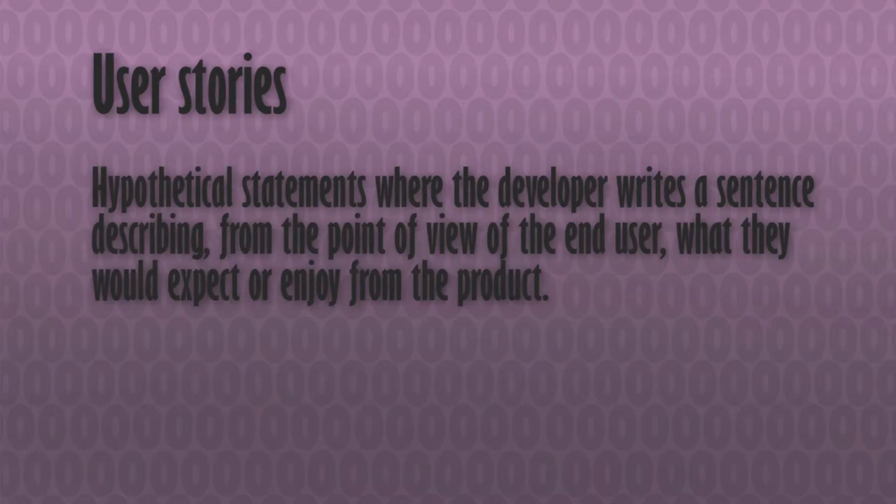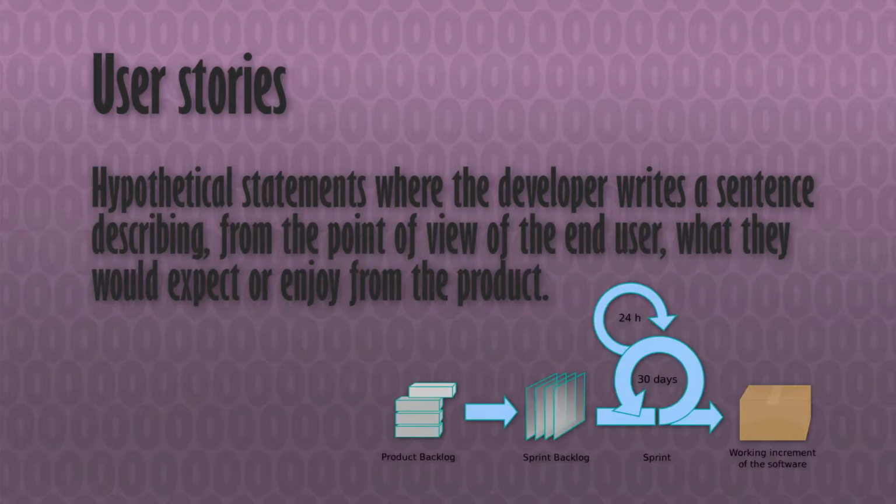The Scrum methodology tells us that we should create a design plan based around user stories. As a player, I want to do X, then building around that simplified concept. With X in mind, the team works for a week or two, and then when X has been prototyped, they view X as a discrete mechanic, decide if it's good enough or not, and rinse and repeat. In a controlled environment, this is a very elegant way to ensure that each mechanic is fine-tuned and fun to play.